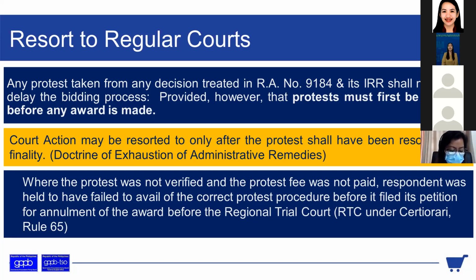It will continue. However, hindi pwedeng mag-award unless ma-resolve yung protest. Now, after na-resolve yung protest, pwede na pong i-award. It doesn't matter if meron pa siyang another action sa proper courts unless makakuha talaga siya ng injunction, which is very rare. There are certain projects na pwedeng even the Supreme Court can enjoin. But most of the time, it cannot. No, damages na lang mahahabol nila.